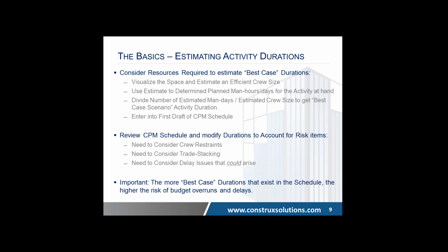When you have best case durations, that means you will be impacted, and your schedule has not actually included a little bit of variance for these impacts. It's generally more than likely that the estimate will be blown in terms of budget and delay than if you did work in a little bit of risk, an extension of time on various activities that you considered had a little bit more of a band of error, room for error. And so that's what I recommend when you're creating a schedule.